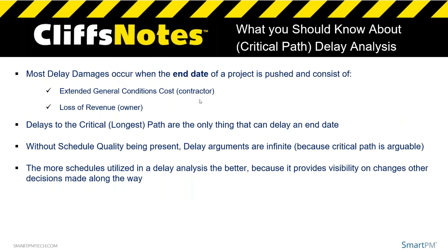And the whole point of that is because if you're a month late as a general contractor, you're going to be spending a month more of dollars on equipment, people, materials, as well as all your trailers, all the little things that cost money, your printers, your computers, your cell phones, all of that stuff racks up. And every month that somebody's there longer was not factored into the budget.